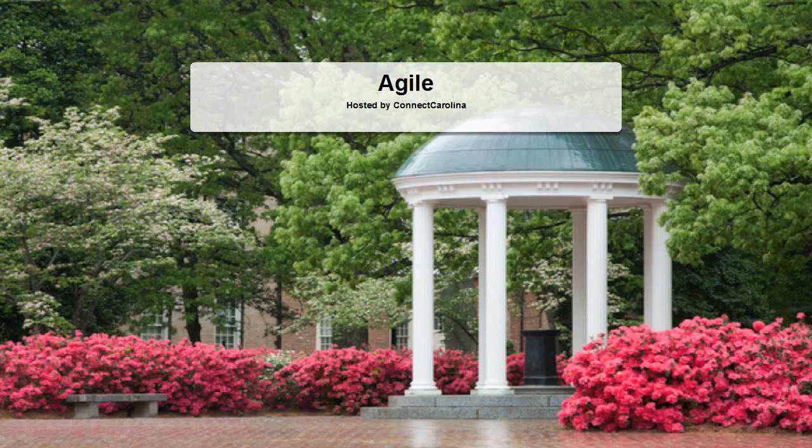Normally, our first step is for some level of analysis. We have epics in there. The stories need to be broken down to a lower level of detail. We need to do the estimation within the team, do the sizing poker. But it could be that it's already well enough defined and it doesn't have to go to analysis and can go straight to development. But most usually it'll go to analysis, and when the analysts think it's ready, it goes into a ready for development queue or buffer, if you will.